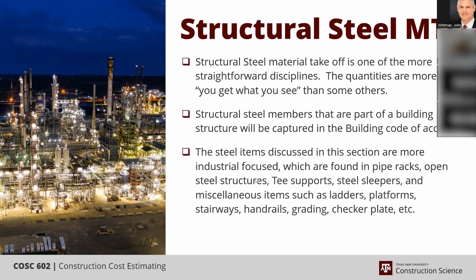But as long as you've accounted for it one way or the other, that would be the key, because I think we all know that unless the pour is about the right size or so controlled that you're going to avoid short fees, most jobs that we bid, we account for a handful of short fees somewhere. We know they're coming. We just don't necessarily know exactly where. And we do it through the price of the concrete.